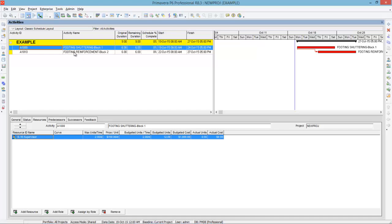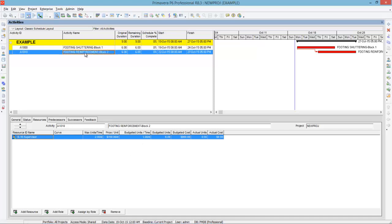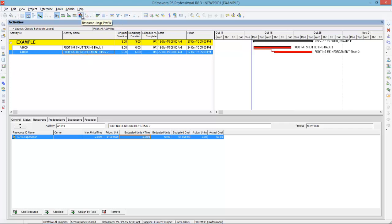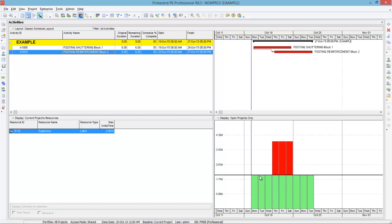Here you can see two activities: footing shuttering and footing reinforcement. For each activity, I have assigned the same resource — supervisors — with a maximum units of two and budgeted units of two, meaning two supervisors are working per day for six days. The same resource has been assigned to footing reinforcement as well. When you click resource usage profile, you can see the profile indicating that on day three, four, and five, you require two additional resources.